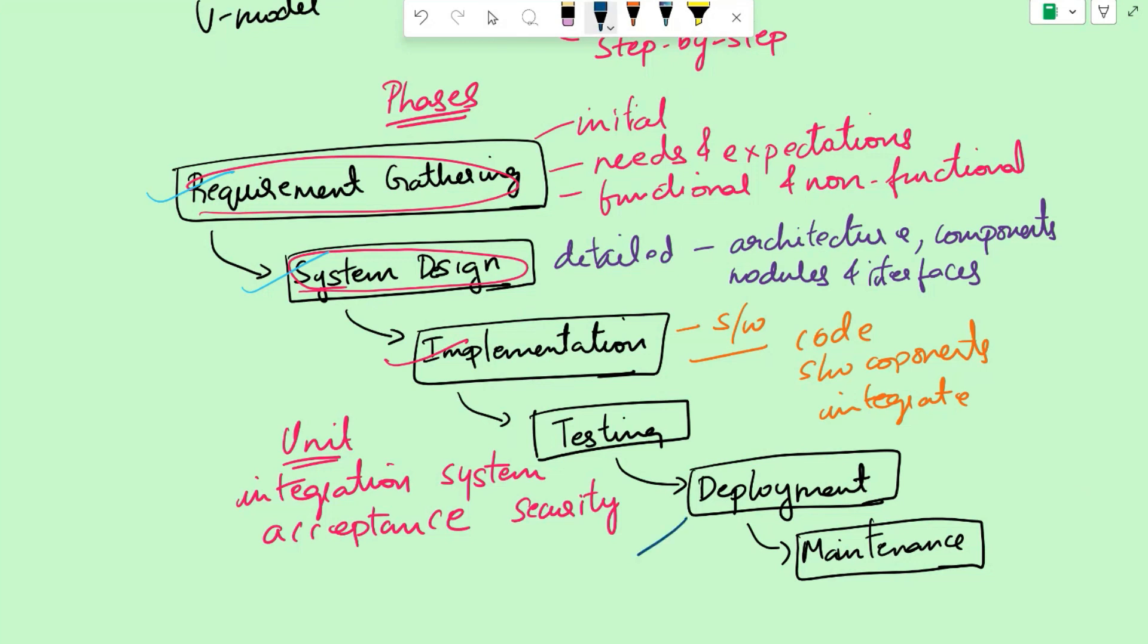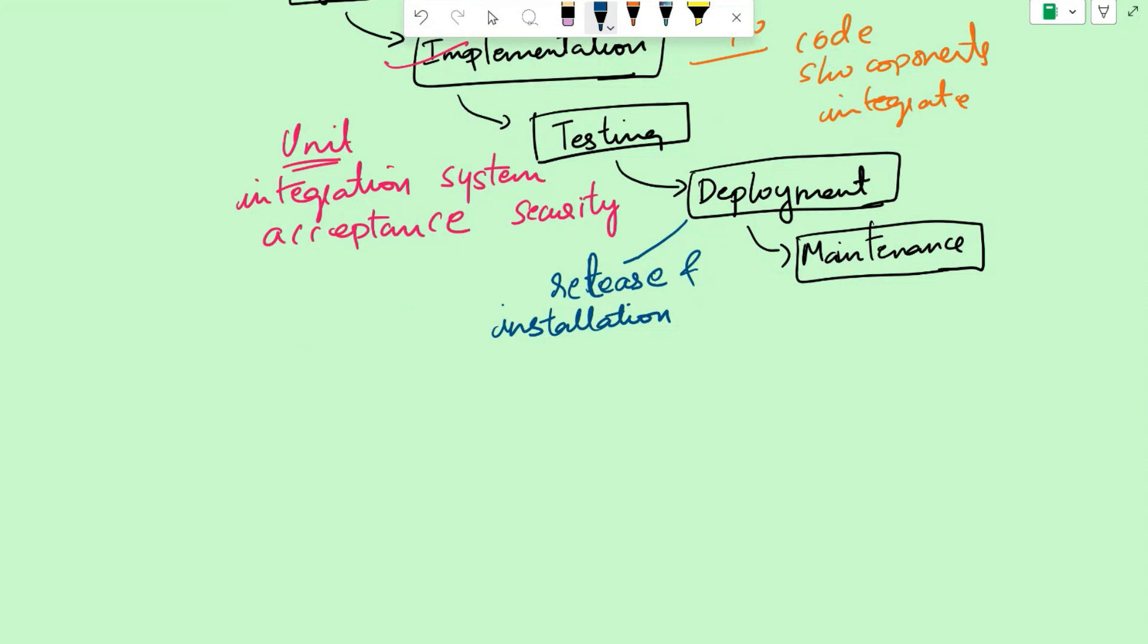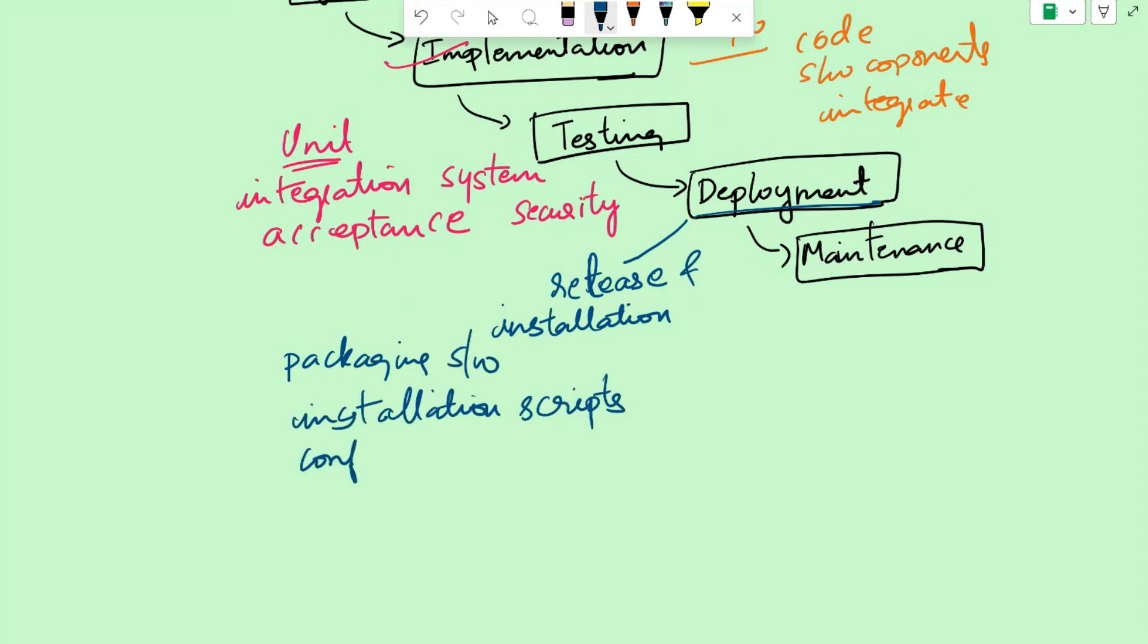Once the software is tested, the software is prepared for release and installation. This is done in the deployment phase. This includes activities like packaging the software, creating installation scripts, and configuring the system for deployment. The software is then deployed to the target environment such as servers, cloud platforms, or end-user devices. In the e-commerce website example, the deployment phase involves setting up web servers, database, and configuring the necessary network infrastructure to make the website accessible to the users.